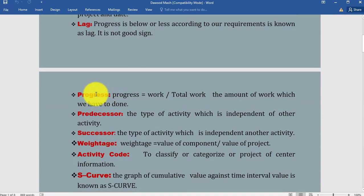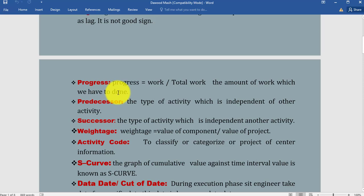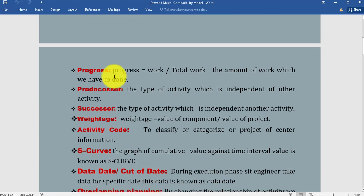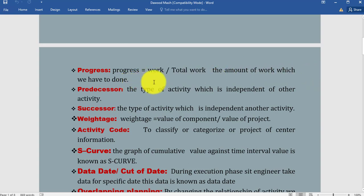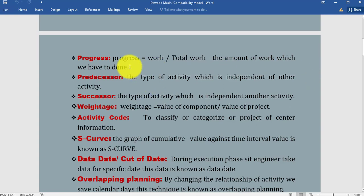What is progress? In our execution phase we use this formula many times: progress equals work divided by total work—the amount of work which we have done. This formula in our execution phase we use many times, so write down this formula in your notebook.